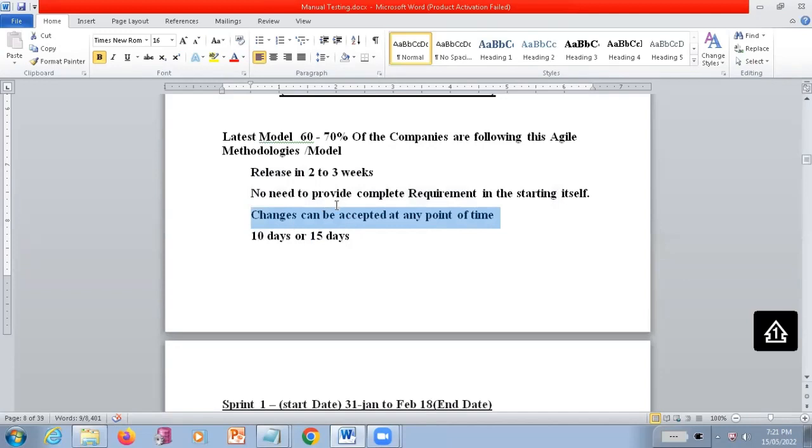See, every 2 weeks once, we are going to release it to the customers. The customer is going to take this application and test it by himself after 2 weeks of time. So whatever we are doing, parallelly the customer is able to view the things. And if there are any changes that need to happen, then and there the customer is going to come up and communicate to us. Yes, any questions over here?